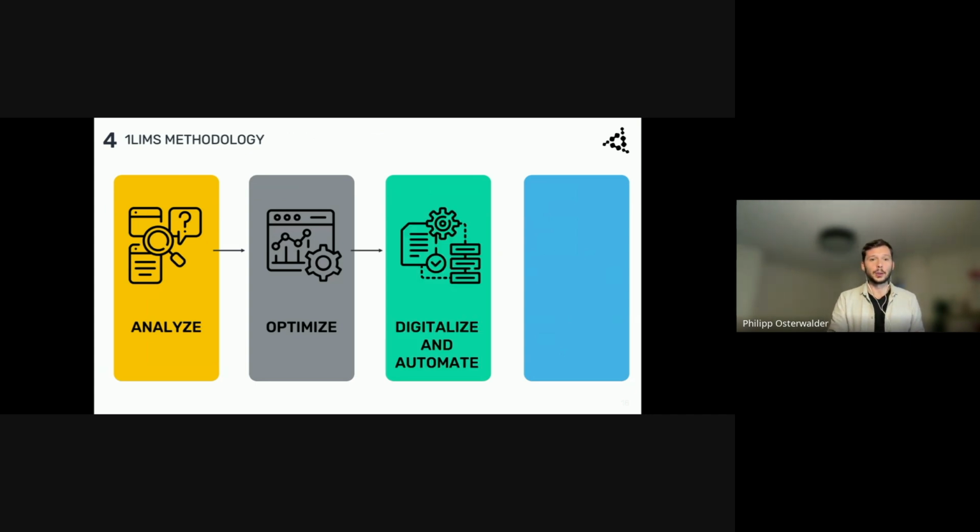In the third phase, we start with the onboarding. We do a technical alignment based on the business requirements, user requirements, and also system requirements for the adaptation and configuration. And we do the power user and best practice user trainings for the onboarding. After the training and after the testing phase, we start with the automation of the fundamental workflows. And then, after a couple of months of usage, there will be the integration, the connectivity to enhance the automation of the workflows.